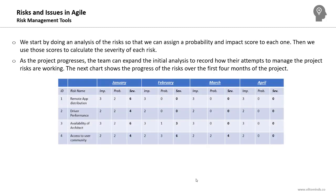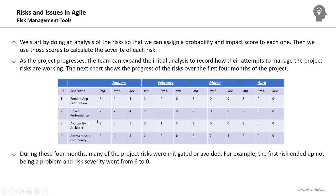The next chart shows the progress of risks over the first four months of a project — an example of monitoring risk severity throughout. Four risks are tracked: remote application distribution, driver performance, availability of architect, and access to user community. Each month, impact score, probability score, and their product — the severity — are recorded. For example, risk one had a severity of 6 in January and 0 in February, either because the risk window passed or a response plan reduced its probability to zero.